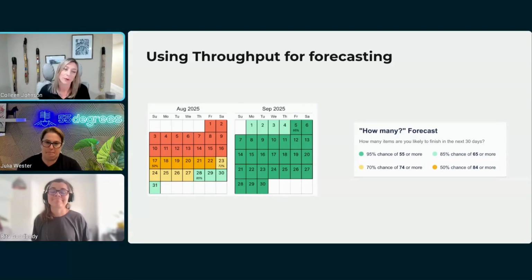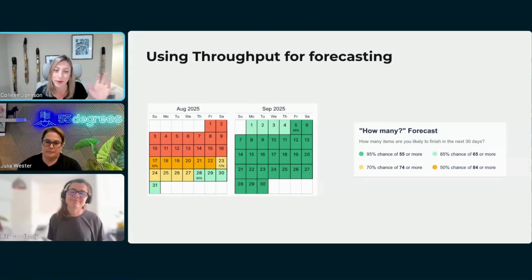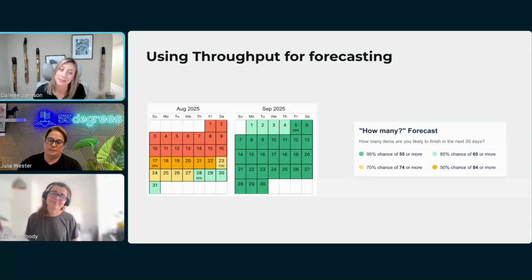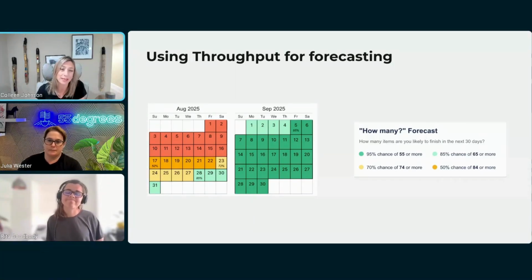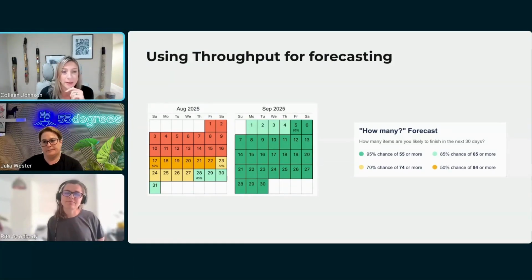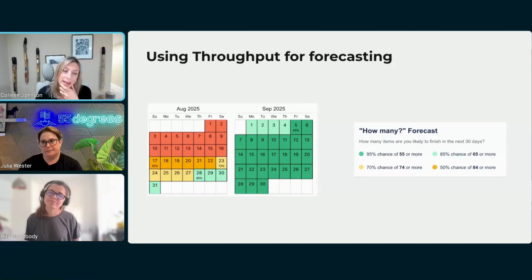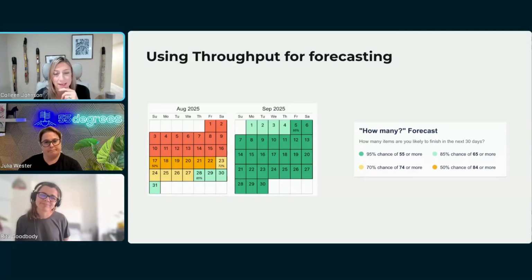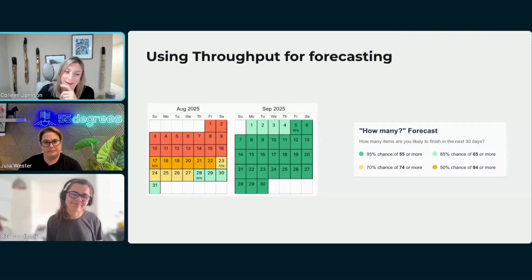Things in the process where work gets stuck, delays because we have handoffs between teams. We're not trying to give you a bad estimate, but a lot of times when we're estimating work, it's hard to account for those things that we can't see. That's already reflected in your throughput data. So you're already starting with a more realistic set of data for your forecast than, like you said, Julia, with some of the other methods that we might be using to try to get better at estimating.